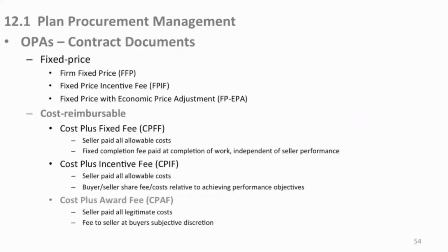That's why you have to have a really good purchasing department and really tight terms and conditions. That's another reason, even though the project management team could act as a purchasing arm, you don't really want to do that, because you may not have the skills to handle all these crazy things, especially on a highly complex, high visibility project with technical, detailed deliverables. But anyway, you'd pay me for all legitimate costs, and I would get a fee at your discretion based on how I performed or for whatever reason.